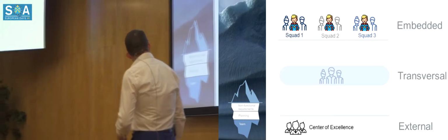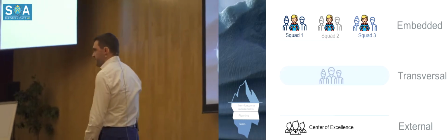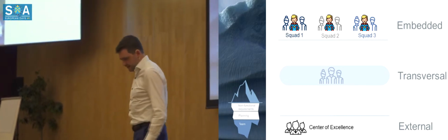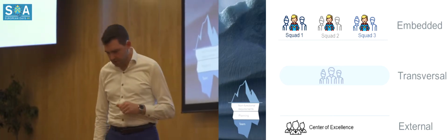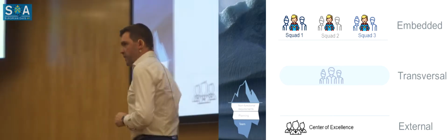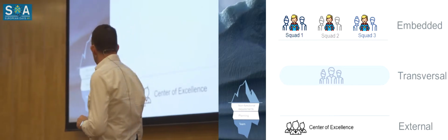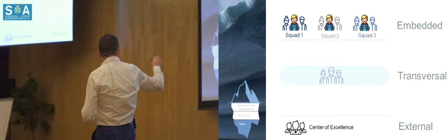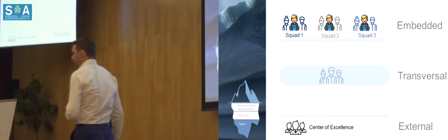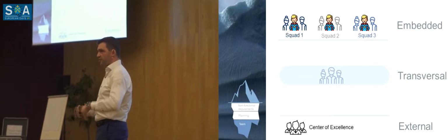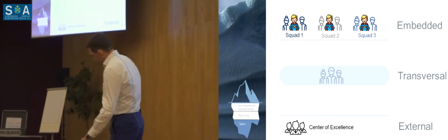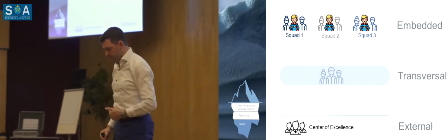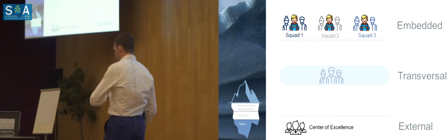And okay, not every team has a performance tester or the performance capabilities. How can you tackle that? I see 3 kind of models. First one is the external one, the so-called Center of Excellence. Some years ago, I worked in such a team, and what we did, we defined a service to the project for performance testing. They came to us, and we did 3 runs, one in the beginning of the project, in the middle, and at the end.